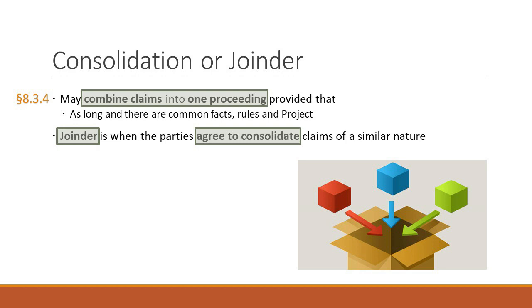So this is the provision. I don't have the automatic consolidation. I have this provision. And so what I'm saying to the architect now, who's kind of being a holdout, is, guys, they have similar common questions of law and fact. I'm asking to join the parties. Will you consent in writing? Contractor has consented in writing. The architect hasn't. I think ultimately the architect will, but at the same time, I have to get it through this provision. So, just as a procedural matter, this is important.